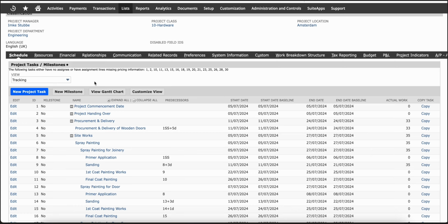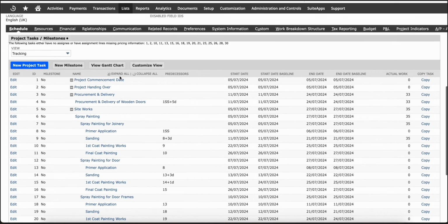They're really just there as placeholders that when you say it's completed, NetSuite will just give you a heads up that, hey, there's a milestone that's been completed, we can now bill a particular client. And this is specific if you are doing a milestone billing approach where the completion of a milestone triggers an invoice creation. So that's primarily the difference between the two.